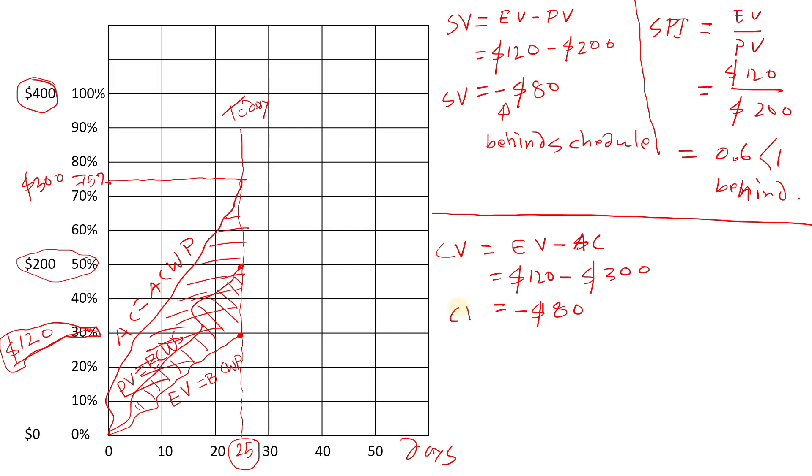That's the cost variance. Again, there is an index, which is sometimes more preferred, called CPI, which is the ratio of these two instead of subtracting them. You simply just do $120, that EV by AC. That's going to be basically 0.4. Again, less than 1 indicates that we spend more. We are over-budgeted. It's not going to be finished at $400. It's going to cost us more.